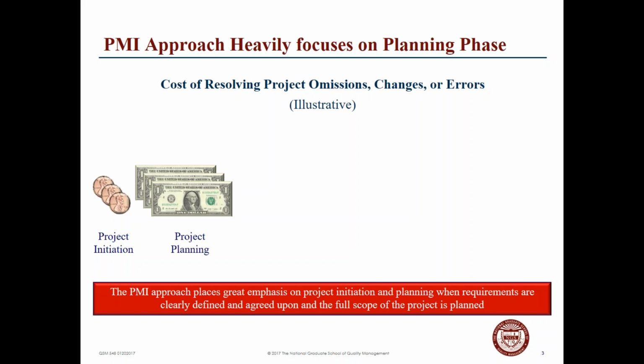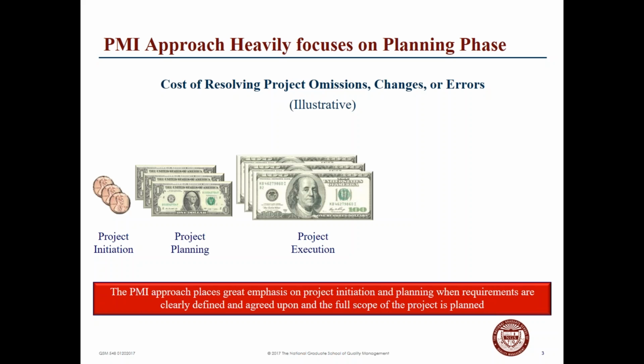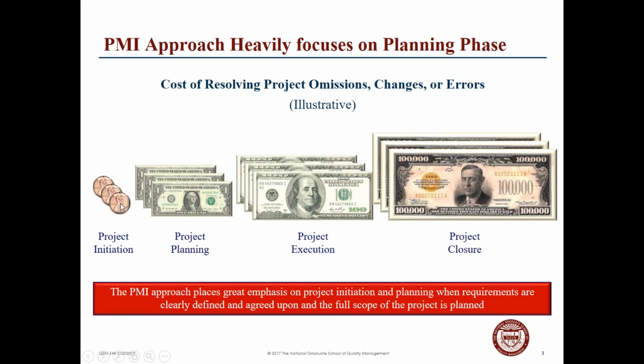We start looking at making some investment when we're executing the planning phase of our project. Spending the resources. So at the beginning, when we're looking at planning our project, those efforts are, generally speaking, more minor in nature and minor in cost. As we continue the journey, you can see that the implications of value of changes and potentially errors or omissions as the project is underway become extremely more costly.